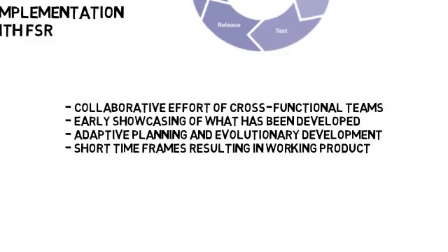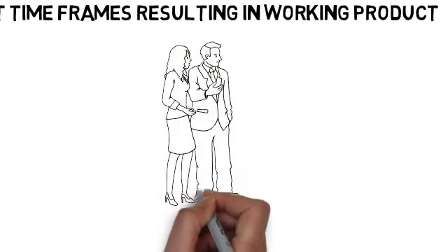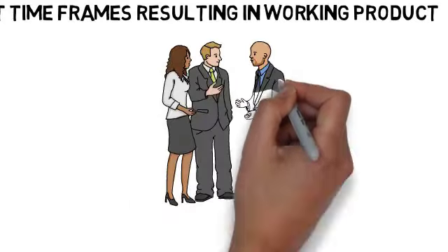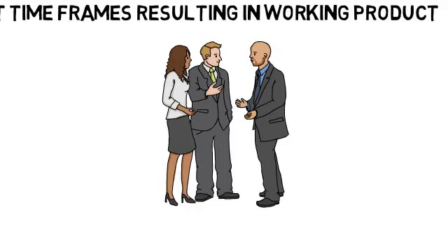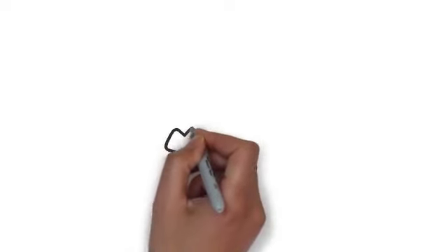Agile is structured to provide frequent opportunities to showcase what has been developed so far through demonstrations and early user testing. For example, when a specific module of the solution has been developed, the development team can present the work and gather feedback for that piece of work. This allows business team members the opportunity to provide early feedback so that course corrections can be implemented as needed, rather than having surprises at the end of a long delivery cycle.